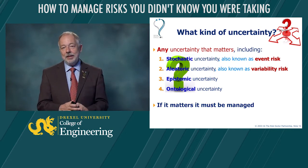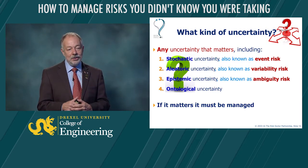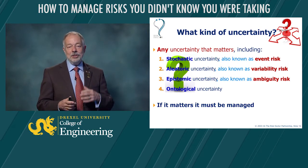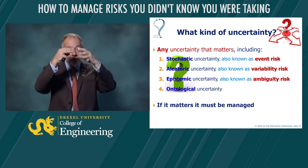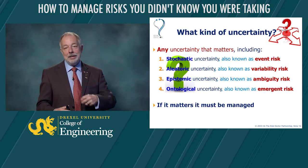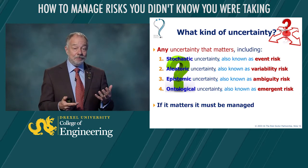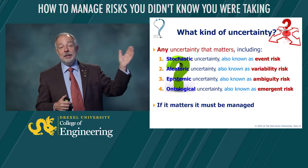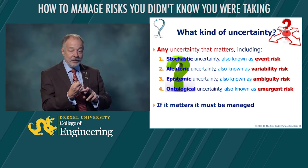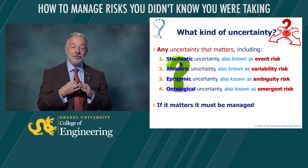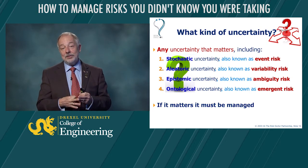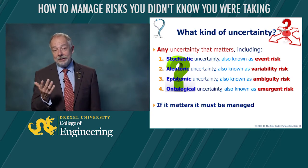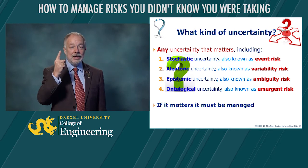The Greek word episteme means knowledge. Epistemic uncertainty comes from our lack of understanding or lack of knowledge — from ambiguity, lack of clarity, lack of knowledge or understanding. And then we have the last category: ontological. Something ontological is to do with your world view, with your frame of reference, with your conceptual framework in your mind. Ontological uncertainty is also known as emergent risk — risk that appears from a place that you couldn't imagine, something that was completely outside of your frame of reference, so you had no idea that there was anything over there at all. It is the truly unknown unknown. So these are the four types of uncertainty: events which may or may not happen, variability around the value of something we're going to do, uncertainty about our understanding or knowledge of something — ambiguity — and emergence of things we couldn't even conceive in the first place.